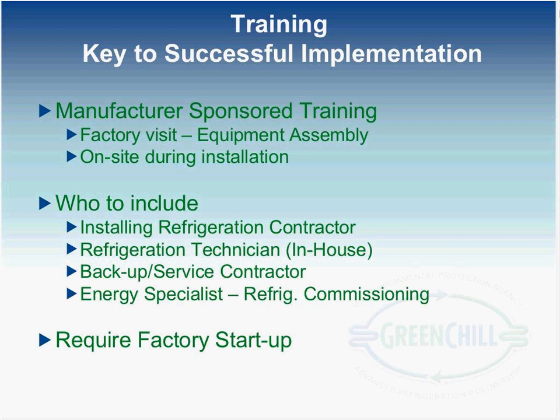We also followed up that training with on-site training at the job site, so that the technicians, the service contractors, and the install contractors all work together to understand the challenges that each group was going to have, from an installation challenge to a maintenance challenge, so that if any issues arose, we can work through those issues together.